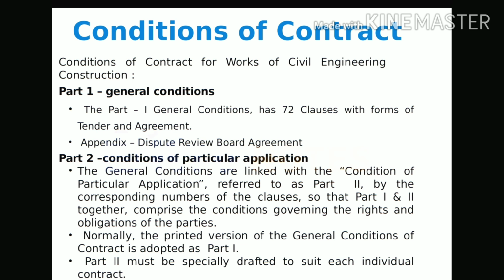During the execution of the works, there is a chance of hike in labor wages and material prices as a result of inflation. The contract conditions should include an appropriate clause for payment of escalation to the contractor.